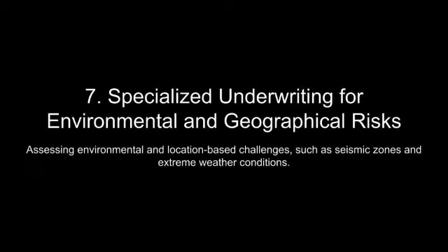Historically, the importance of robust contract analysis in surety underwriting has been underscored by high-profile construction failures and legal disputes. The construction of the Sydney Opera House, for instance, highlighted the consequences of poor contract management, including incomplete scope definitions, inadequate contingency planning, and contentious change orders. Lessons from such projects have informed the development of modern contract templates, such as those provided by the American Institute of Architects or the ConsensusDocs Coalition, which aim to standardize best practices and reduce ambiguity.